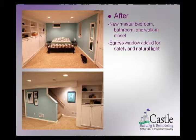In this bedroom, there's probably two more cans right here, and I might suggest a single attractive decorative center fixture, which would probably take $800 in recessed cans and drop it down to a lighting bill of $250. So that's one way we can help make sense of a budget. If you love recessed cans and the grid work works out in that basement, we can do those too.